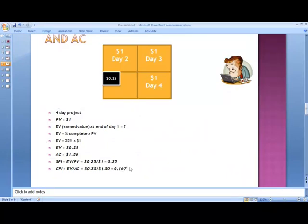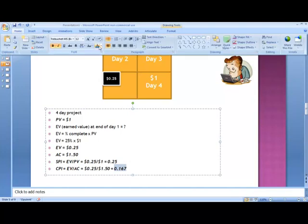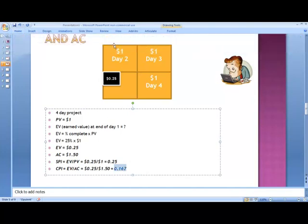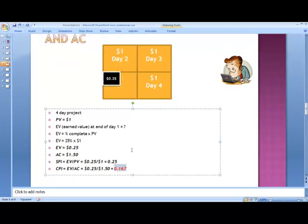So the question is, what does that mean? What does 0.167 mean as far as actual cost? Well, what that means is for each dollar, and that should actually be in red because that's a horrendous CPI.